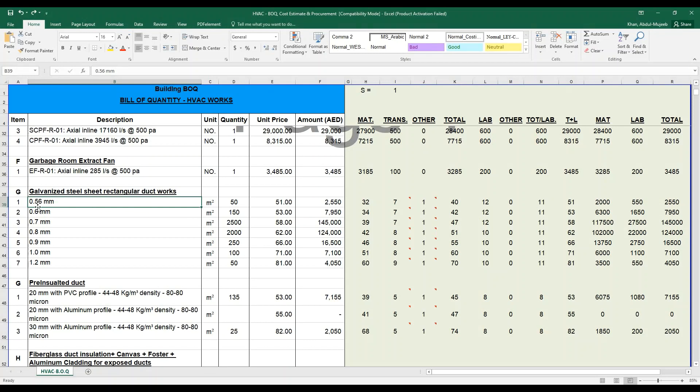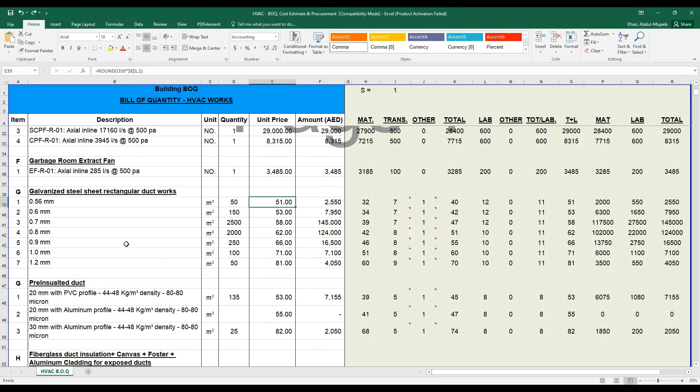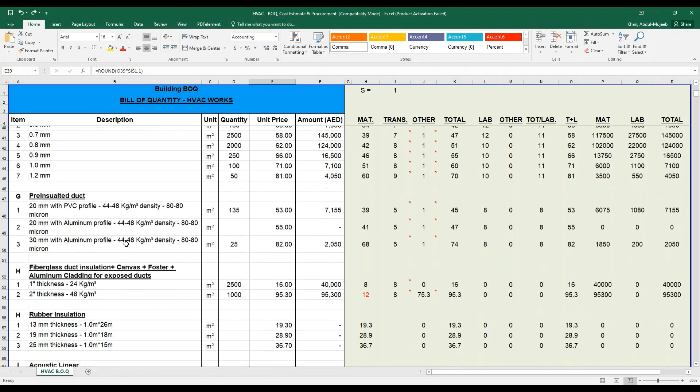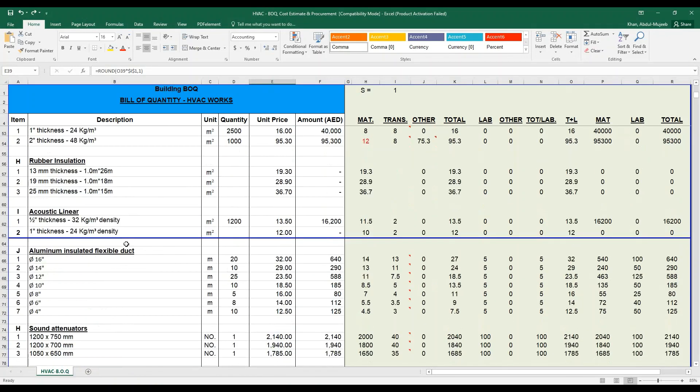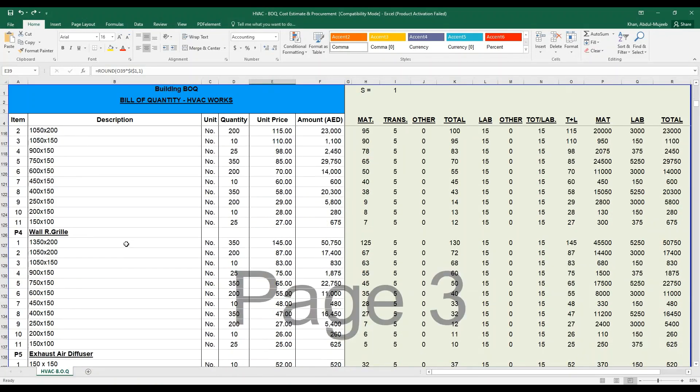Here you can see it has been measured in mm, the thickness of the galvanized steel sheet for the rectangular duct work. For example, a 0.56 mm sheet is calculated by square meter in 50 square meters, and the unit price calculated here is 32. Based on this criteria, you will get your total unit price.